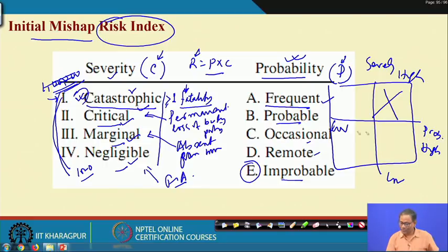Then here probability is low, severity is high, it may be there. So, that means probability low, severity high. Your severity must be reduced; your prevention measure will be severity oriented here. Now, probability and severity both low, this is the most desirable one,